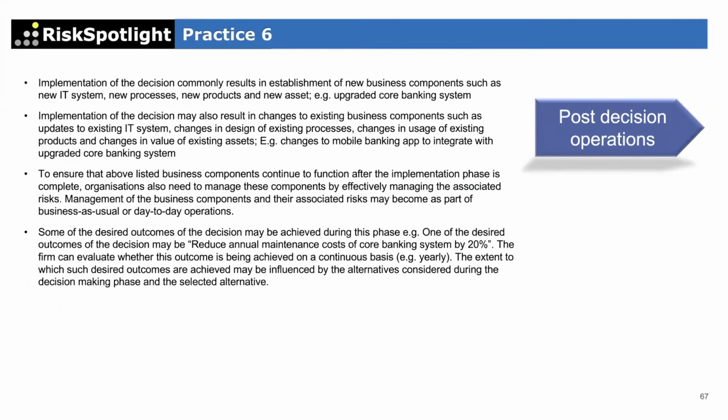And then once the project is completed and our core banking system is now on the cloud, we need to update our operational risk register, so that we can assess and manage the controls related to all those cloud-specific risks, which we did not have when our system was in-house. So that's where this decision has changed the profile of your operational risk.